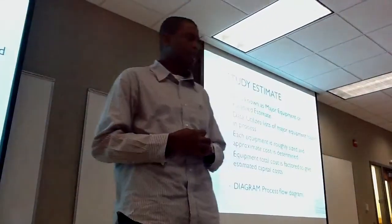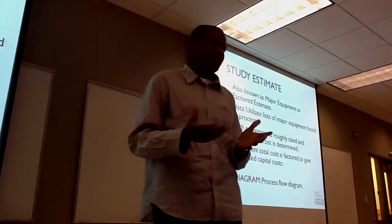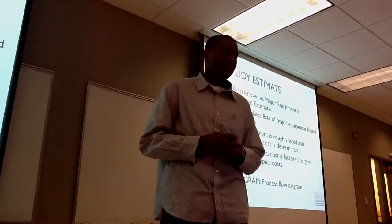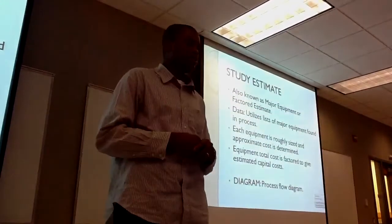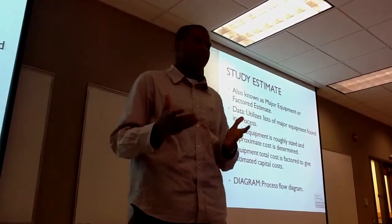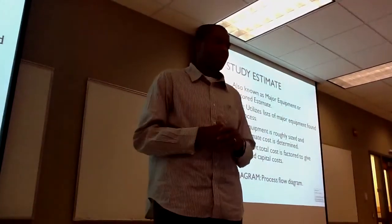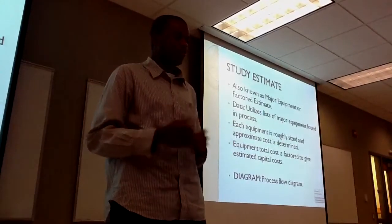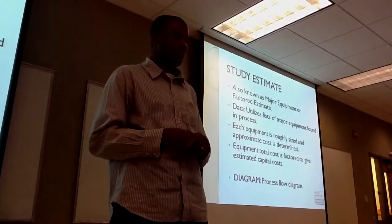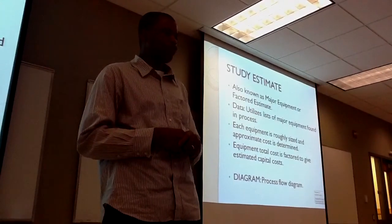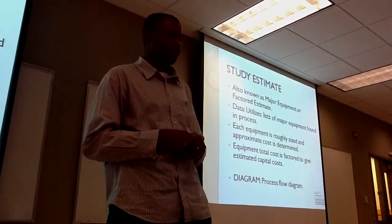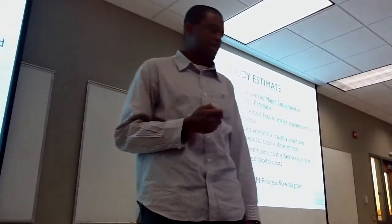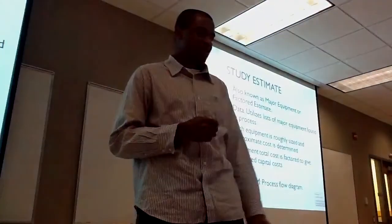The next is the study estimate, also known as the major equipment or factor estimate. The data needed includes the major equipment found in the processes, where each equipment is roughly sized and an approximate cost is determined. The total cost is then factored to give the estimated capital cost. The diagram required here is the process flow diagram.